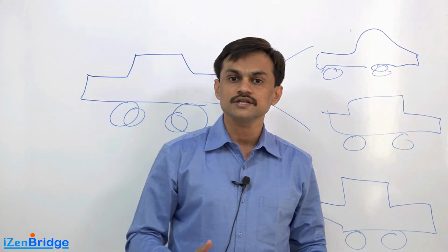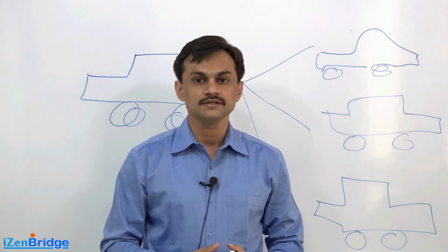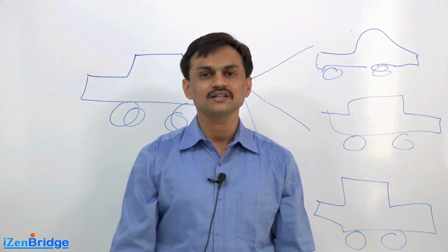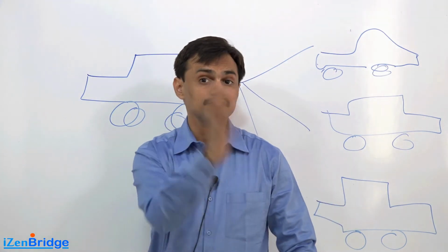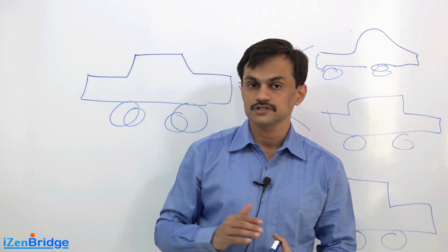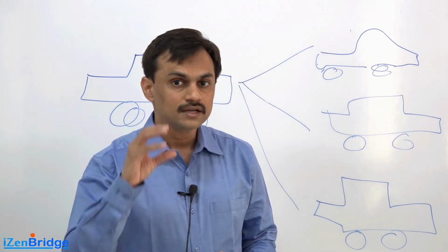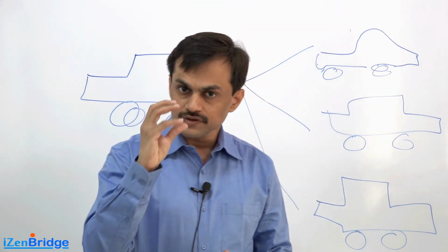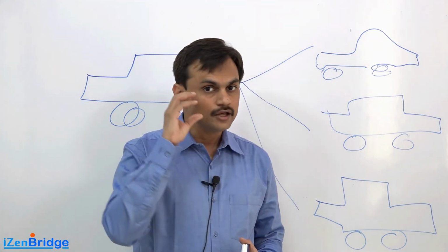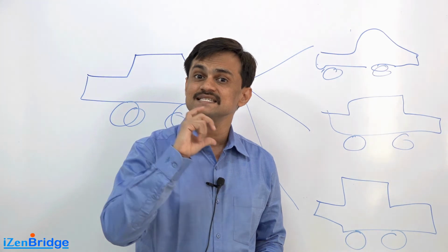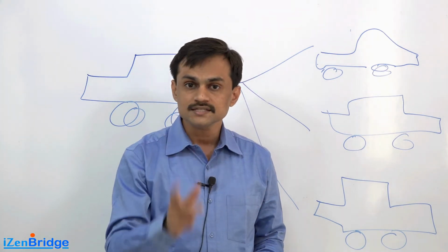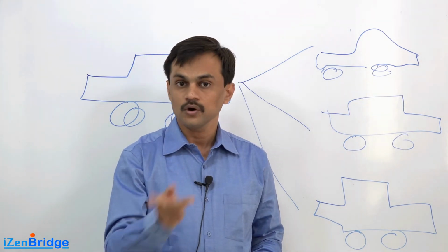Many of your stakeholders, people from quality teams, people from expert groups may come up and say, no, this is not the quality we are looking for. We are looking for a different quality. Now you need to be clear, as per your project mandate and your project sponsor's expectation, what grade, what specification, and what target segment your product is expected to adhere to, and you need to meet the quality for that segment. You don't have to design a $1,000 mobile phone for a customer segment of $100, or vice versa.